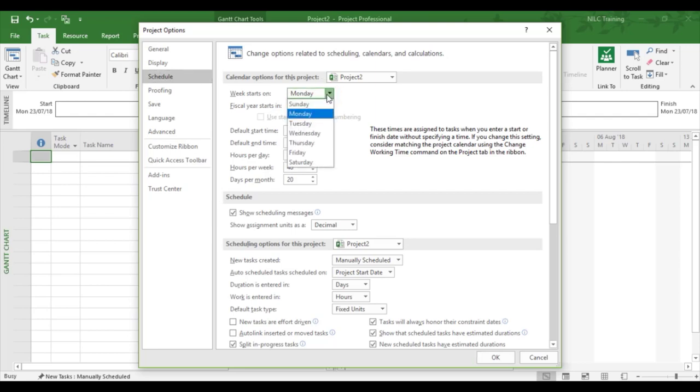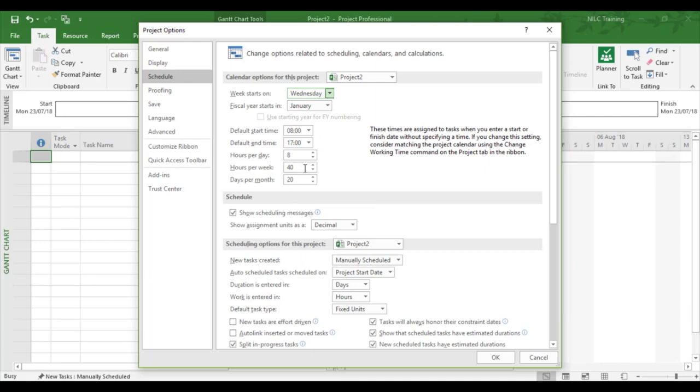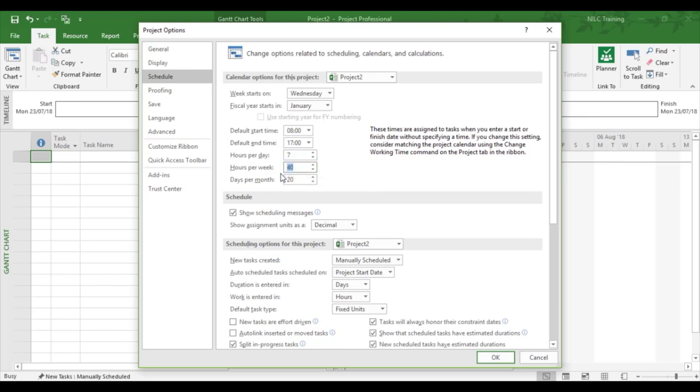So we'll start off with telling it the day we want. We want a day to be Wednesday. We want the hours per day to be seven. Well, five sevens are thirty-five, so that's why I'm putting thirty-five in the working week.